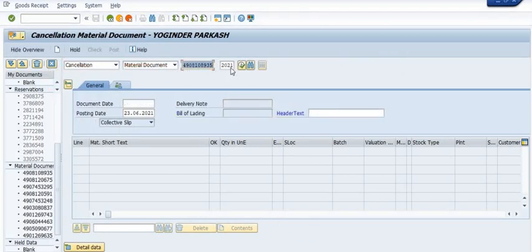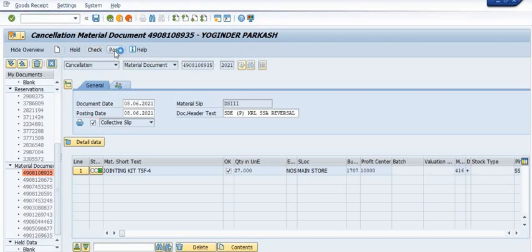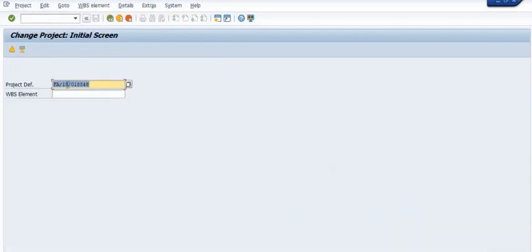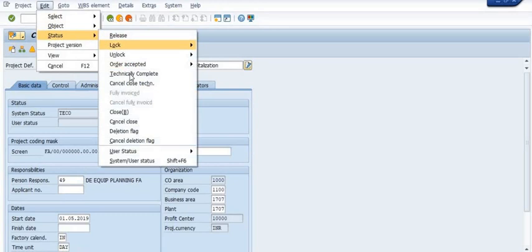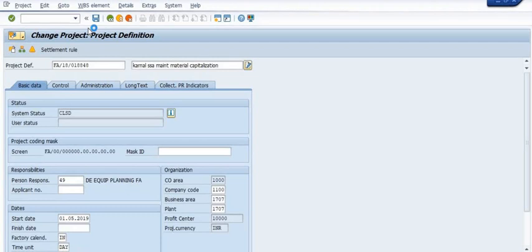For cancellation, you have one option: if you execute this transaction code, you need to consume this stock, or otherwise reverse this document — so this activity will not be reflecting here. Once we reverse this stock, the system will not give any error because we have successfully cancelled the transfer posting. Now everything is okay.